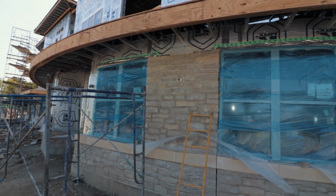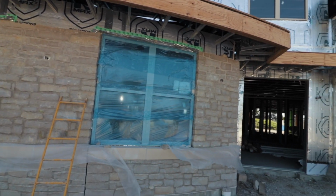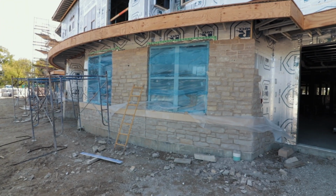Now we're back to the Whitley. We are coming around the southeast side for the brick. The brickies are then running west around the backside, doing all of their stone. Our guys did all of our drip edge. We have the TPO, the penthouse roof crew, coming next week.